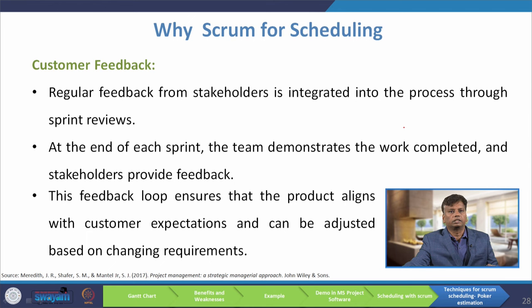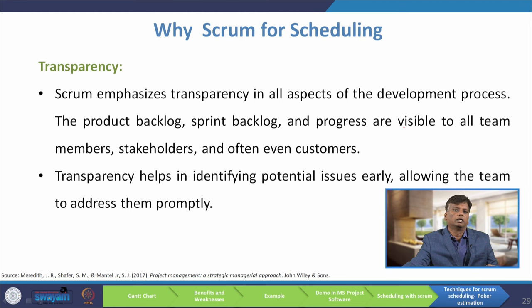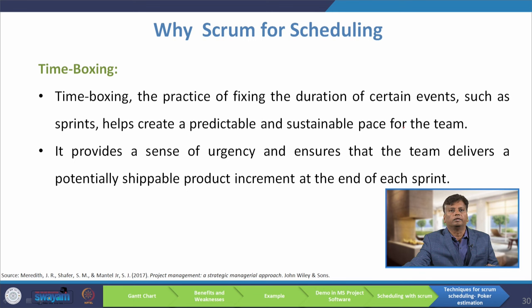The second reason is flexibility and adaptability. Scrum is designed to be flexible and adaptive to change. The product backlog can be re-prioritized, and the team can adjust its plan at the beginning of each sprint during the sprint planning meeting. This adaptability is crucial in dynamic environments where requirements may evolve or unexpected challenges arise.